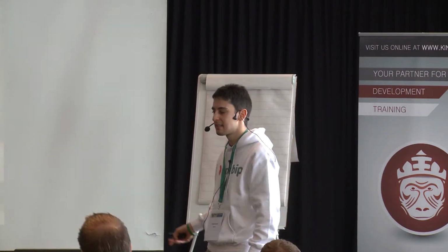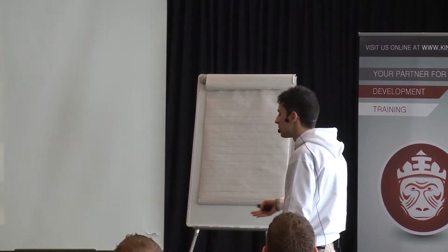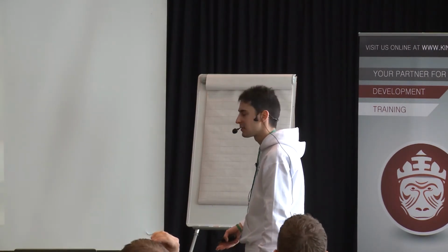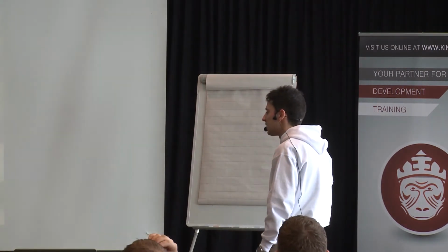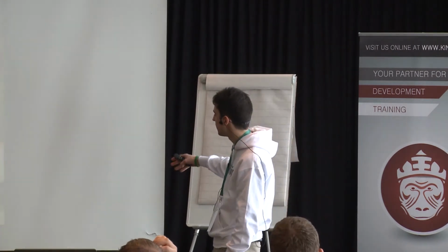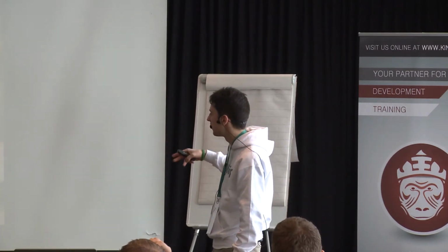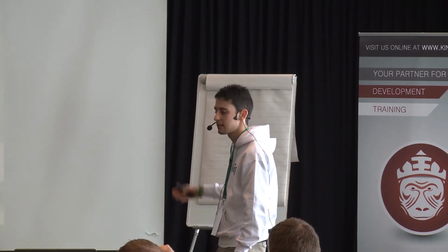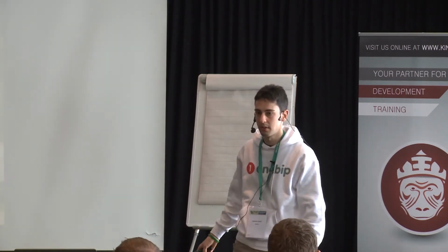The people in ER are on the manager's schedule for the duration of the week, and if they work with Pomodoro, they will be continuously interrupted, and that is normal. But at least if we put 2 people in ER, we save the time of the other 8 people in the team that are working on normal development.